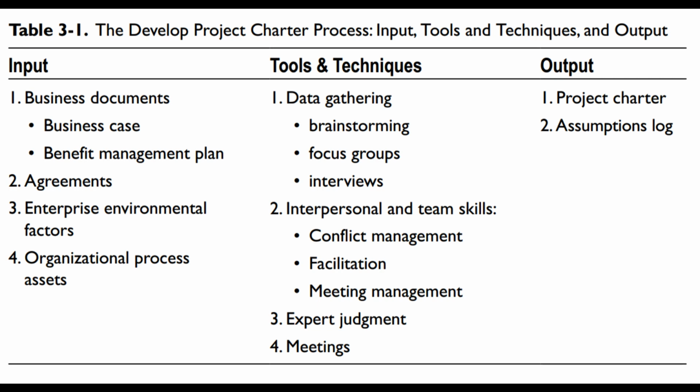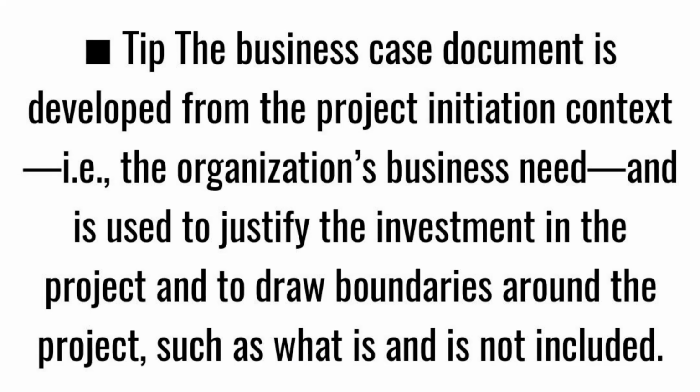The other input items for the process of developing a project charter are discussed in the following paragraphs. Tip: the business case document is developed from the project initiation context, i.e., the organization's business need, and is used to justify the investment in the project and to draw boundaries around the project, such as what is and is not included.